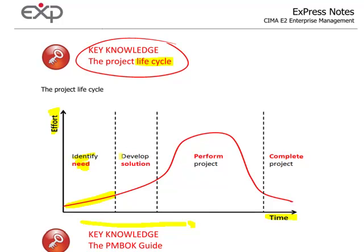The second stage, we look at developing a solution to whatever that need was. Time is going by, but the amount of effort is increasing. Once we've developed the solution, we actually undertake and perform the project. When we start performing the project, that's when the amount of effort increases — the highest level of effort is during the performing stage. Then the final stage is completing the project, furthest down the timeline, and the amount of effort drops down.